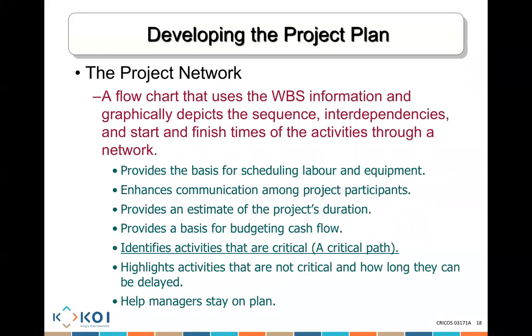Now, ladies and gentlemen, what is a project network diagram? A project network diagram is really a flow chart that uses what we call the work breakdown structure information and graphically shows us all of these interdependencies, how everything is linked. It shows what should happen first, what should happen after, how all of those activities are related, which activity might start first, which activities might start later.